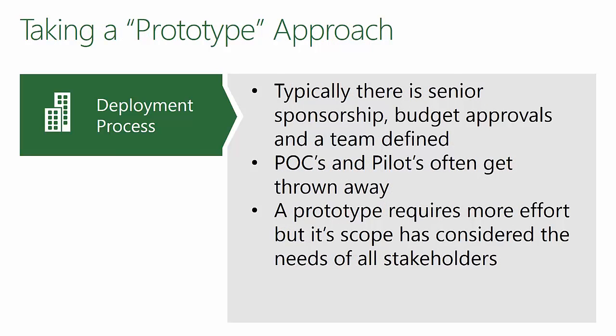When you initially deploy the tool, think in terms of a prototype. This is where you bring in the appropriate individuals to sign off on the implementation. Think in terms of a prototype largely because the tool is completely blank — there are no configuration settings within it, so it's hard to run a proof of concept without anything to really measure. Taking a prototype approach means you can take what you've discovered and move it into your actual implementation.